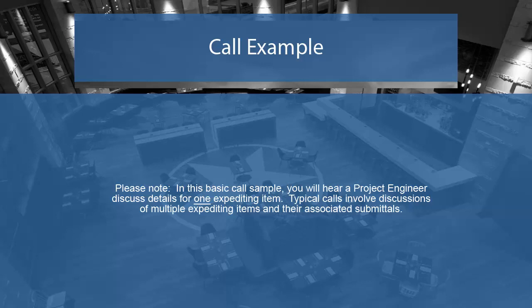Okay. Let me ask you, I am going to send you in that list a list of your submittals and materials that you have in your scope. Okay. Yeah. But I wanted to go over any materials that you have with a long lead time. Yeah, that's good because we've got some rebar with a 3 to 4 week lead time after approval for each of the 2 buildings in the project. Okay, so you have separate shop drawings for each building? Yeah, we're going to be doing this in phases. So building 1 shop drawings will be in your hands on Wednesday and building 2 by the end of the week. Awesome. That looks like it falls right in line with our schedule.